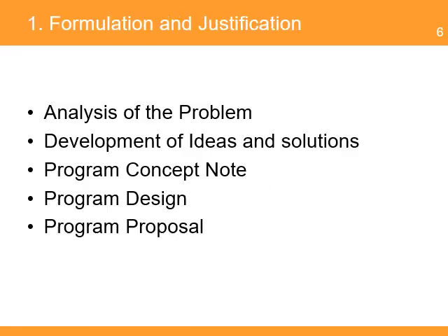In this sub-phase, the organization works to develop a program proposal, which will include the identification of ideas and solutions and other studies, and develop some early estimates of scope, resources, and cost. It will develop the initial risk assessments and develop a program concept note. The organization will identify a program donor, develop a program proposal, and will include the participation of key stakeholders in the design of the program. An important step in this phase is to ensure the program is aligned with the organization's strategy.